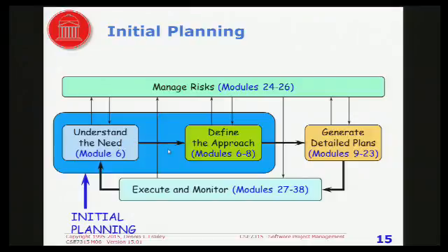It's the kind of planning you do, for example, when your boss comes and says, we're thinking of bidding on a project to do such and such, and I want you to tell me how long it'll take us to do it and how much money it'll take. I don't want you to plan in detail how to do it. I just want a rough estimate of how much money and how much time it's going to take. That's a very common scenario for a person in any kind of management or leadership role. So you go through these two steps.